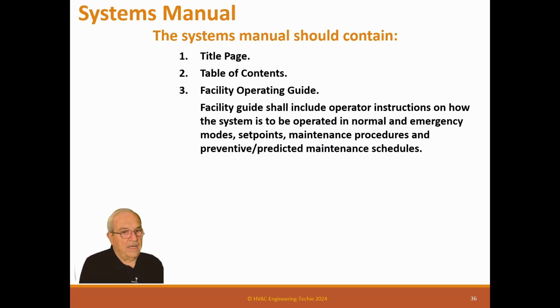And a lot of times the O&M manuals may not have everything because the things you're doing are cross systems. So you're doing set points and maintenance modes that may include many pieces of equipment or many systems, and this is very helpful to operators. They know, okay, this is the way we basically need to operate it. It doesn't detail everything in the maintenance manuals. It just details the overall normal operating procedures and anything special we have to do.